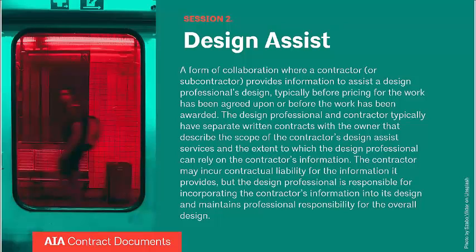And what naturally flows from this is that the design professional maintains control over all aspects of the preparation of the construction documents, including the responsibility to integrate contractor-provided information into the design and identify and resolve design conflicts.